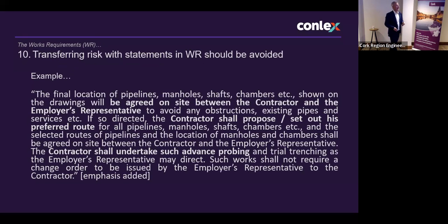Transferring risk. I hope there's nobody in the room who actually put this into a specification. Transferring risk with statements in the works requirements should also be avoided. What I mean by that is trying to put items into the works requirements to shut off compensation events, or transfer risk over to tenderers with regards to design or the ground conditions, won't work, bearing in mind that the works requirements is very much down the pecking order with regards to contract documents. It's below the contract, it's below the schedule.